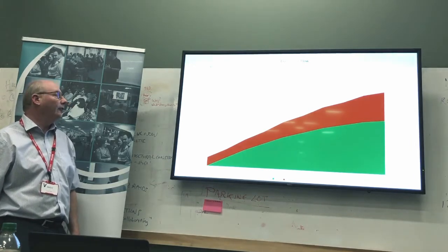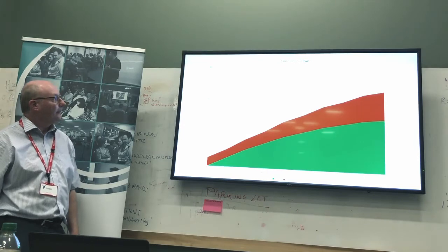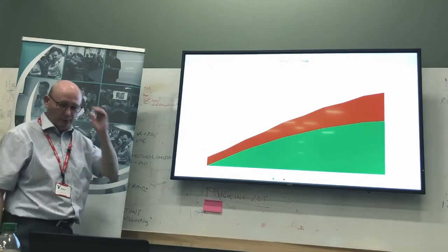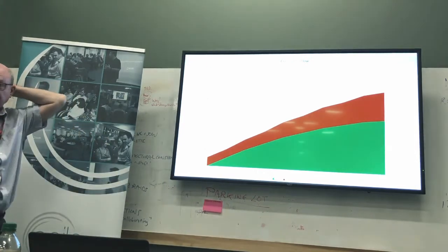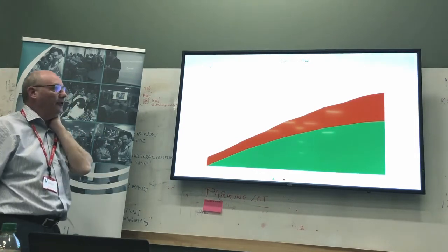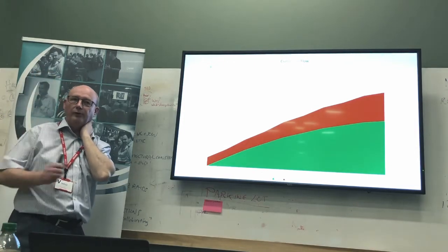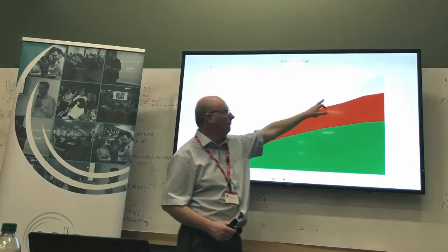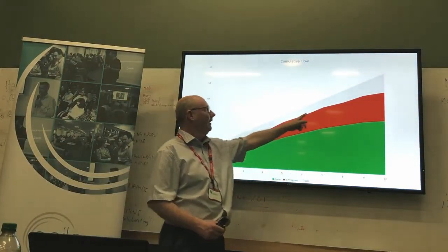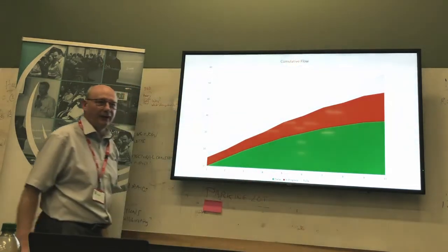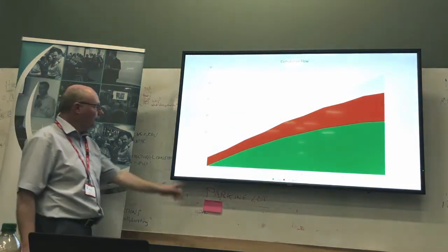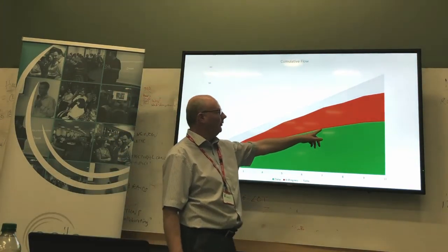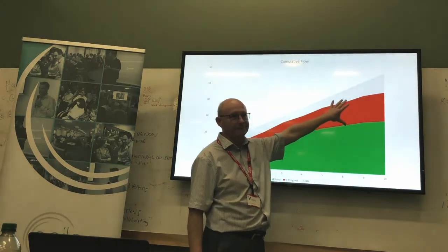Okay, so this is an interesting pattern. Never mind the numbers along the bottom, they're not days anymore. This is more of a program pattern. You know that in order to get to the proposed release date on time, you have got to start stuff at this speed. So you try. But the problem is, that's faster than you can actually go. So you don't finish it at that speed. And the finish line starts to fall away from the started work.